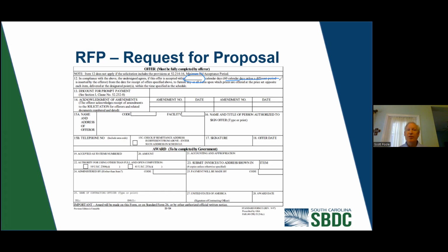So sometimes they'll say, keep this going for 270 days that you have this bid. They can come back and say, well, you agreed to keep this price. Your indirects might have gone up a little bit during that time, but you agreed to these charges.